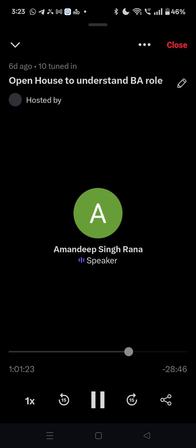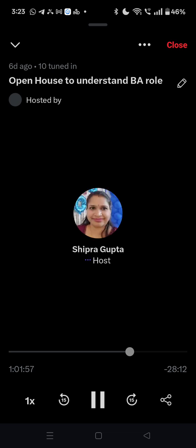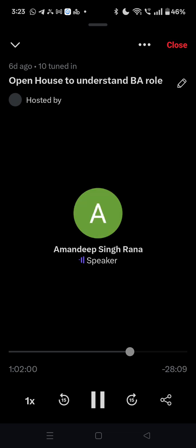Sometimes I've seen cases where the testing team says the dev team has given the story points, and to save their effort, the testing team says, okay, whatever effort dev has given, just apply 30% of that and give it to us. We'll do the testing in that much effort, 30, 35, or 40%. But sometimes QC says no, because this is testing-heavy work, I'm going to give my own estimates. So it depends on project to project.